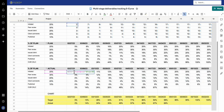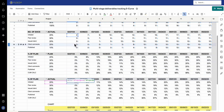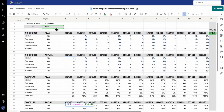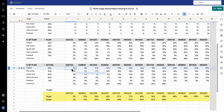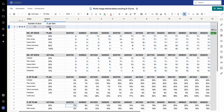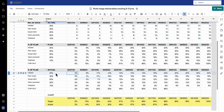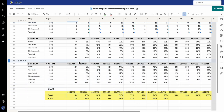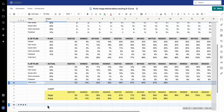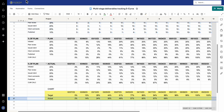So what this section here is doing — for the percentage of actual — is again looking at this piece. It's saying: of the number of actual documents, it takes that number and multiplies it by the project row value, then multiplies it by the percentage overall. That way it works out what the total percentage of the project has been delivered thus far. So if each document when completed is worth 6%, but when it has only 20% completed then it is a much smaller percentage — and we won't go into the maths. So these are how the numbers happen, and overall you can see the five percent going up to 100 — this is the plan replicated into this row down here, and this gives you the actual versus planned.